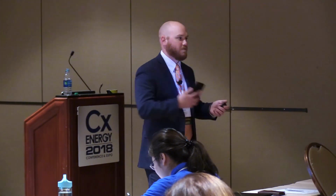The next actual why is going to be the controls. You have extremely complex controls in these spaces that have very low tolerances. Typically as commissioning agents, we hold office buildings and your standard air handling equipment to roughly 10% tolerance between what we're actually reading with the TAB guys versus what BAS says. In a lab space, we don't have that luxury. We usually hold them to 5% or less.